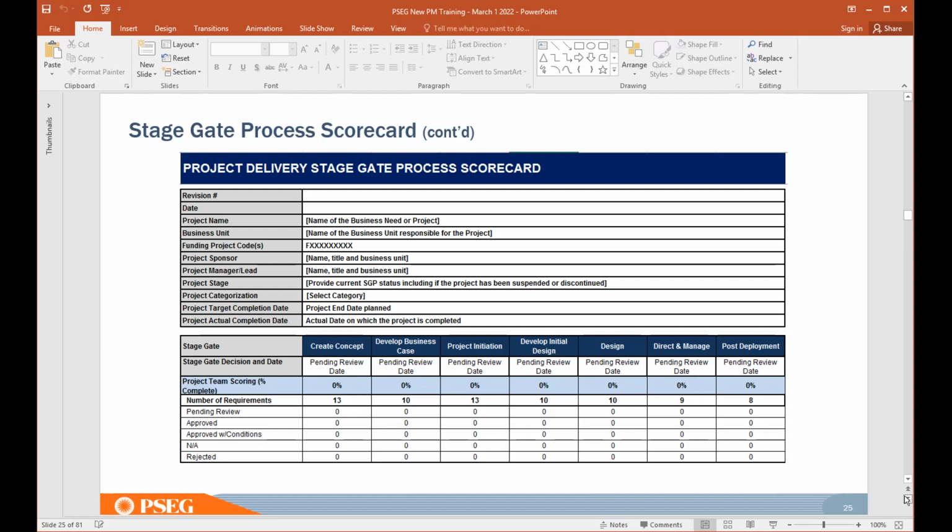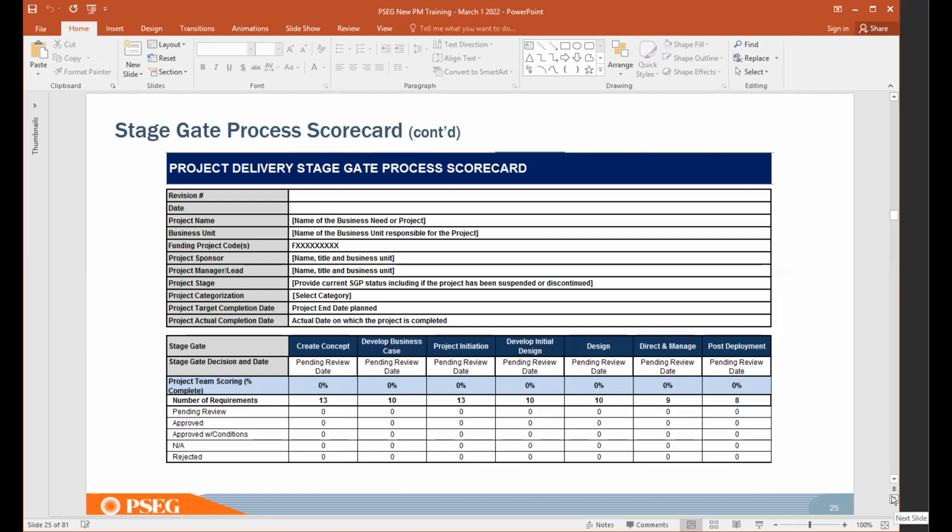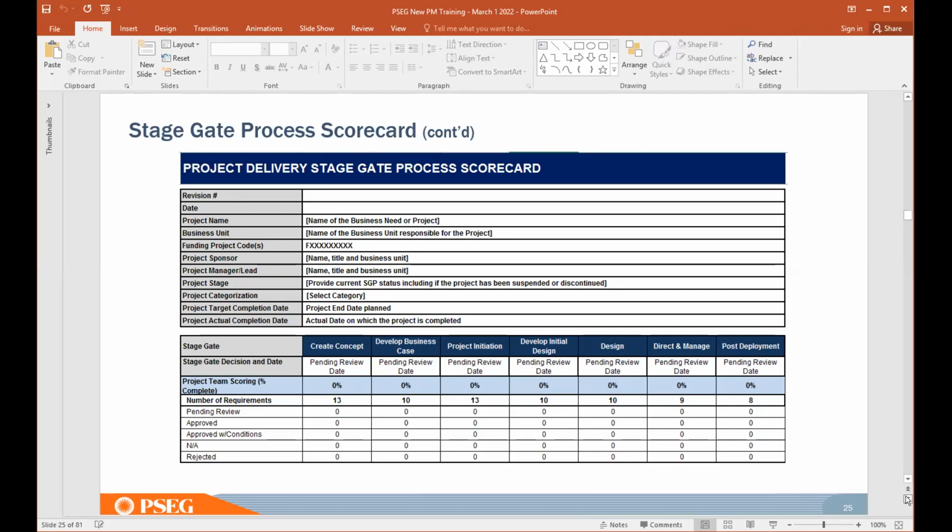Number two, somebody from IT EPMO will get in touch with you, or they will review offline, and if there are any questions, they'll get in touch with you or straightaway give you a yes, no, or ask some clarifying questions in an email. Typical turnaround time can be 2 to 3 days, not more than that. The whole process doesn't take much time, and it can be pretty quick.